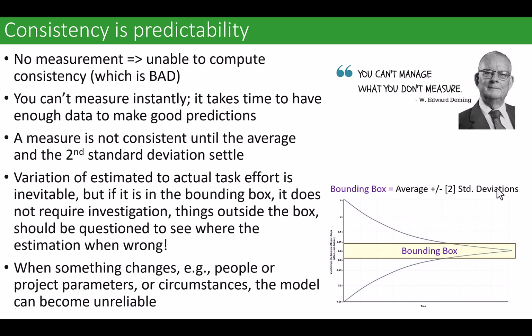And ideally, the average variance between what you estimated and what it actually took to deliver should go to zero eventually, plus and minus. And again, some tasks will be easier than we thought, some will be harder. But the idea is, in the aggregate, we're going to get to a place where we can make a commit of X number of story points and say, this is what fits in X number of story points, like Tetris blocks.